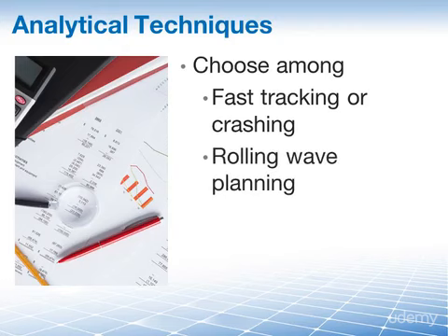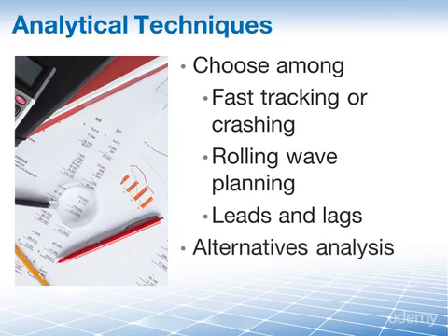Should you use rolling wave planning? This is an iterative technique in which the work to be accomplished in the near term is planned in detail, while the work in the future is planned at a higher level. When should you apply leads and lags on your project activities? This is a refinement that's applied to develop a viable schedule by adjusting the start time of future activities. But you also need to know about alternatives analysis.